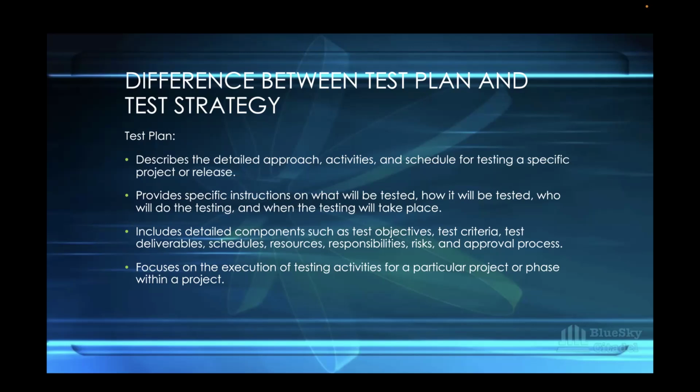Test plan also provides specific instructions on what will be tested, how it will be tested, who will do the testing, and when the testing will take place. It also includes detailed components such as test objectives, test criteria, test deliverables, schedules, resources, responsibilities, risks, and approval process.